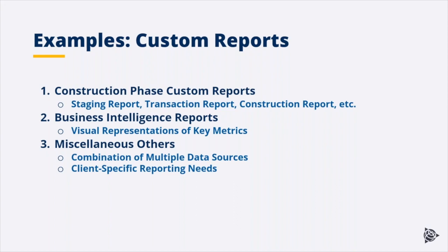So the key thing to understand about custom reporting is, one, does your system vendor allow for custom reports? Two, there are going to be additional costs to implement custom reporting options. That's additional cost in terms of both the money for development purposes and the time to implement. So a custom report may take anywhere from several weeks to several months just to get it up and running and into the system.